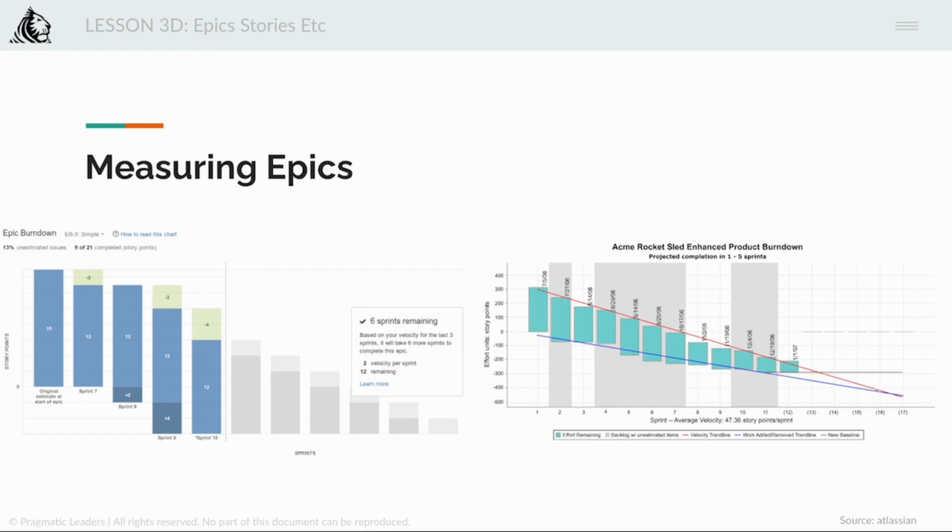Or the business managers are pushing too hard and the product owner is not able to give a pushback. The scope grows faster than the team can absorb it. There is another possibility, right? The team is just not capable of handling that much work, but the scope is just coming and coming, which basically means that we need to add more people or improve the quality of the people. Something needs to be done, right?